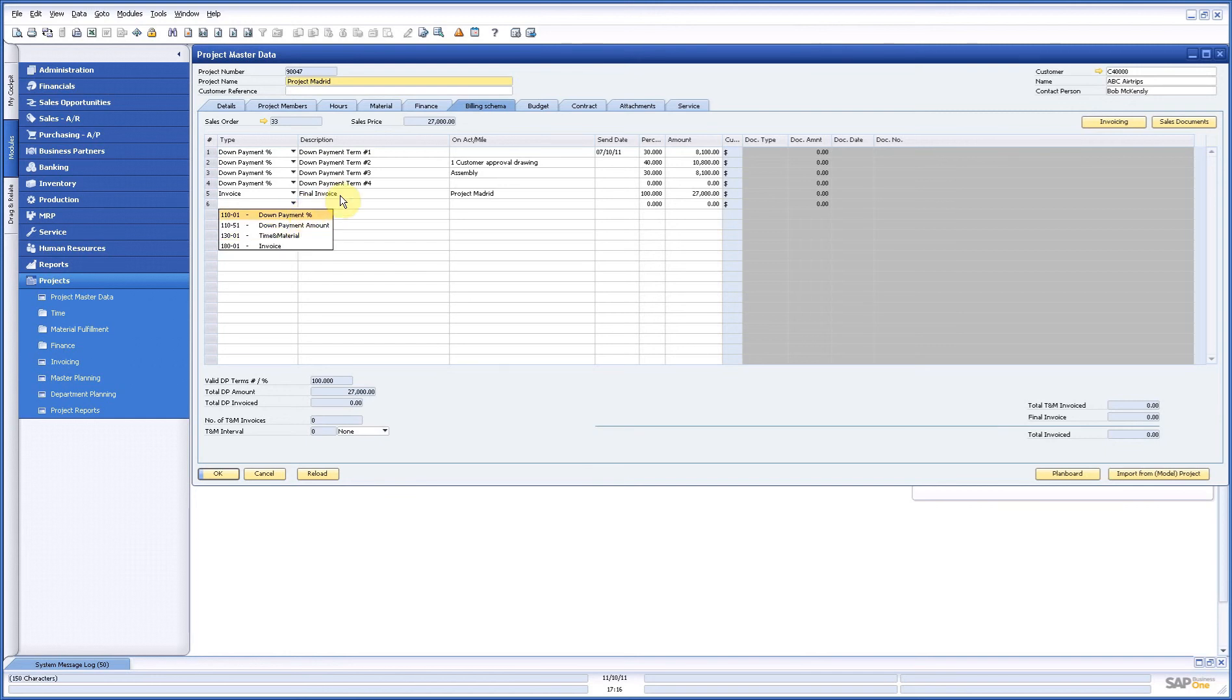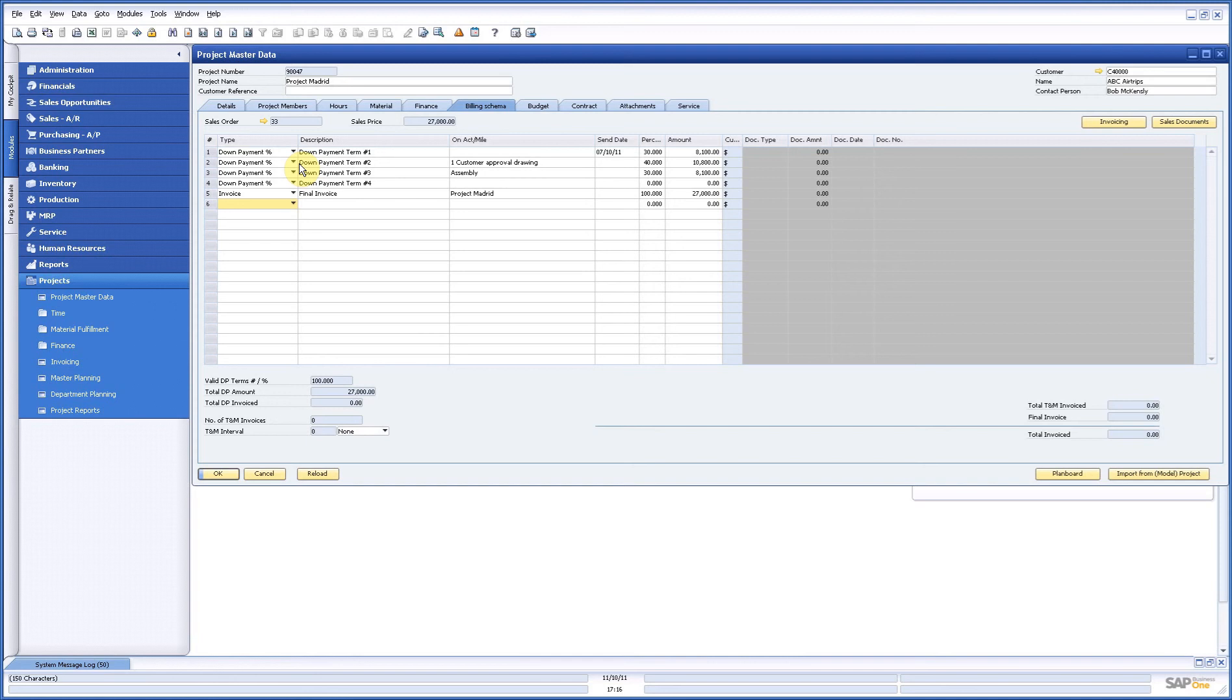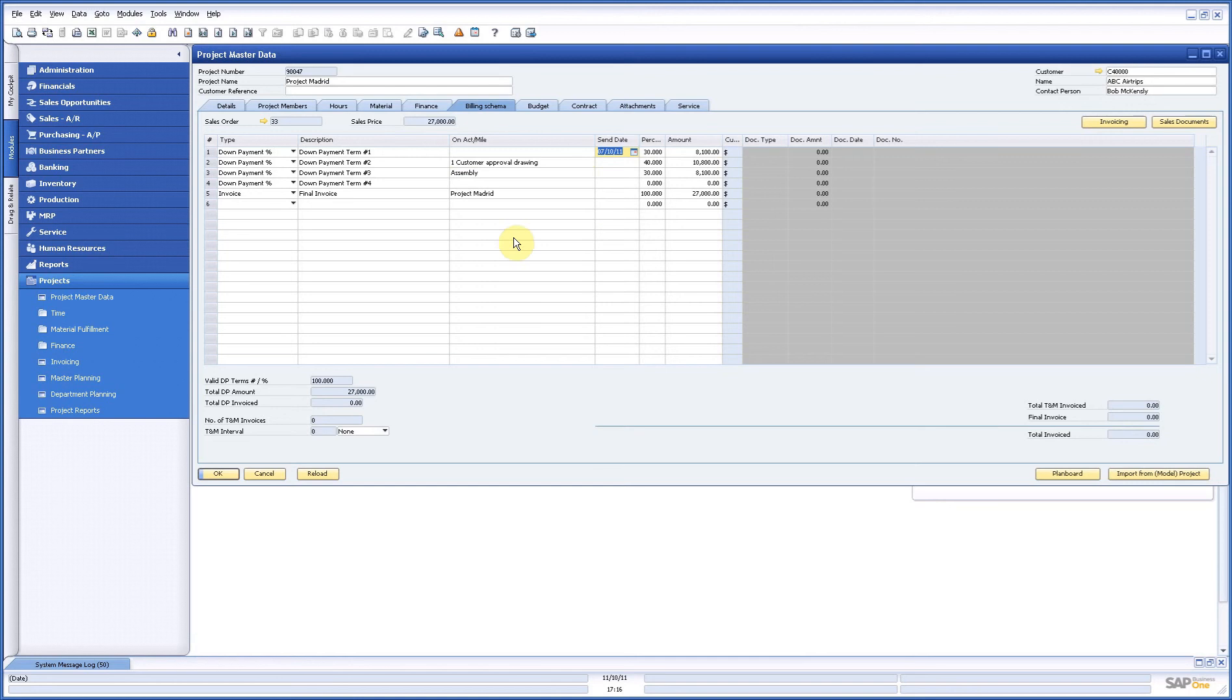Now let's do a fixed price. I already copied it as we saw the complete billing scheme which is very convenient because we can link it as we see here in this example to milestones to activities which are finished or I can link it on a date if I want to.